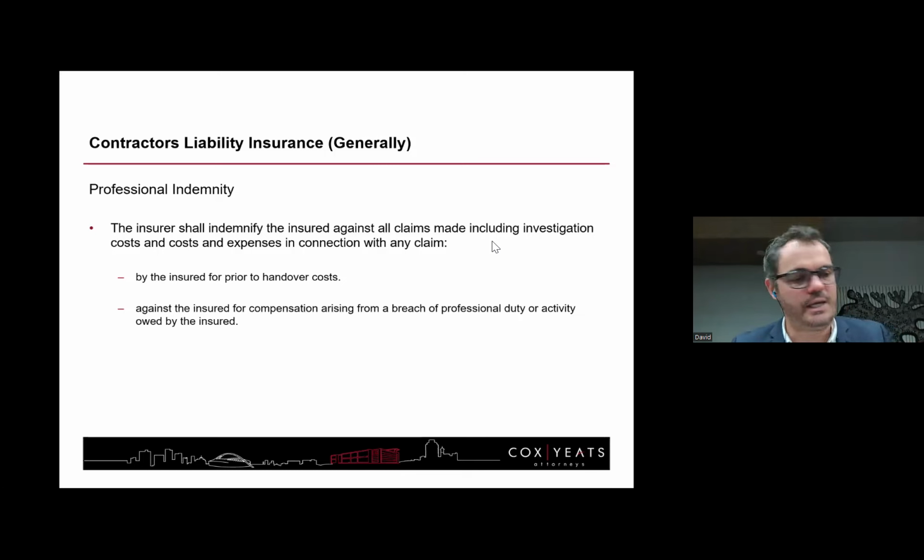Someone who checks that they are working 100%. So that's the difference between supervision and inspection. And the person who designed the works that are being constructed ought to be supervising or inspecting, because remember, they've got to sign the cert at the end of the day that says, yes, this has been constructed to my design. So that is the short and the quick answer.